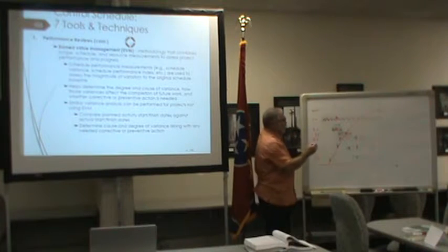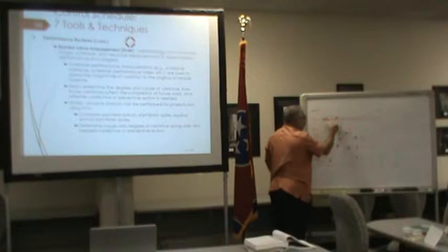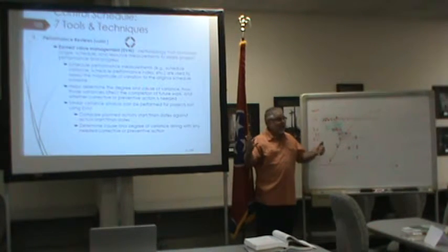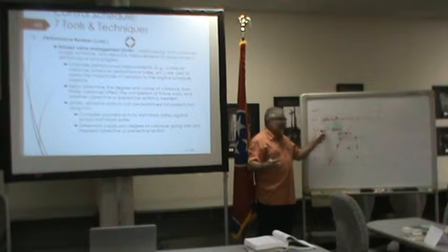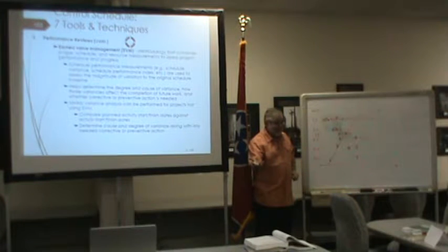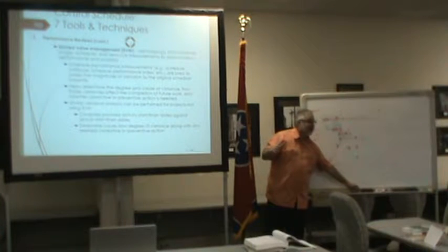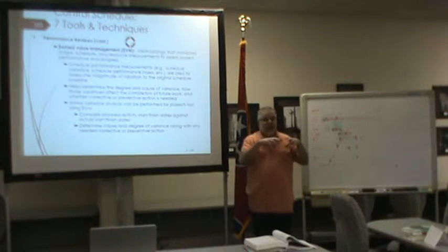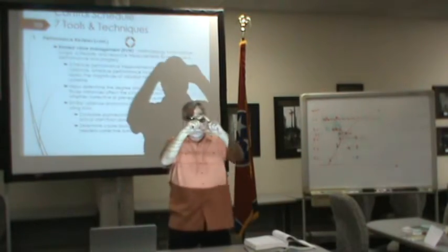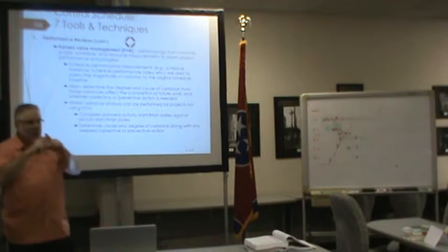So now I'm going to compare what I spent, $8,000, with what I thought it was going to take, $10,000. And you just told me that's good. But if it takes me 12 to get it done, how much value do I claim? 10. Is everybody comfortable with that conceptually? Okay? So see the connection then between doing the budget and then doing the work, and it's still all three pieces: scope, schedule, and budget to do earned value.